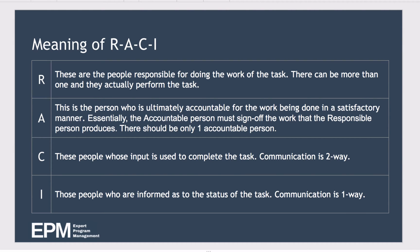What do each of these terms mean in a little bit more detail? Responsible — these people are responsible for doing the actual work of the tasks; they're the ones sitting there and getting it done. There can be more than one of them. Accountable is the person who is ultimately accountable for the work being done in a satisfactory manner — they are the person that must sign off the work that the responsible person or people are producing. There should only ever be a maximum of one accountable person.